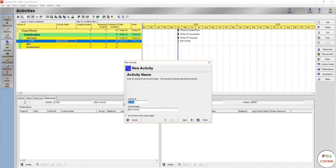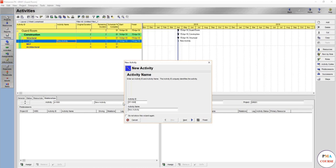So let's take an example for such thing. You can write ST-1000, which is structural 1000. It's just the number 1000, 1010, 1020 for the structural works. Or you can make it structural, let's say for excavation, EXC-10.